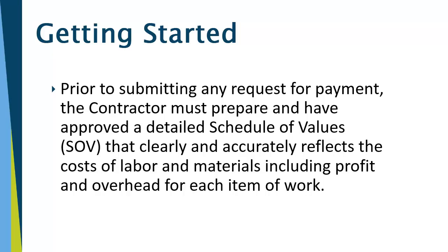Prior to submitting any request for payment, the contractor must prepare and have approved the detailed schedule of values that clearly and accurately reflects the costs of labor and materials, including profit and overhead for each item of work.